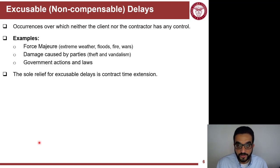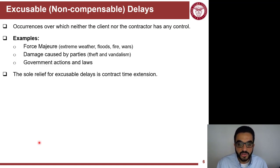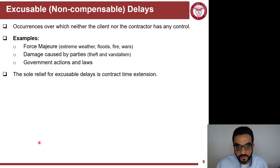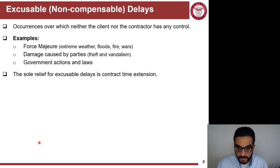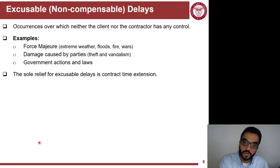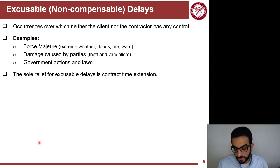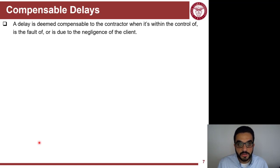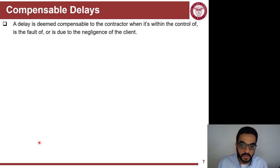The other type is excusable but non-compensable — things that happened not because of the owner and not because of the contractor. These are out-of-control issues such as disasters, force majeure, third-party damages, things not within possible control of the project team, or things imposed by government actions and laws. These require some kind of excuse for the contractor, but only in the form of time extension — this is why it's called non-compensable, meaning you are only allowed to finish later but are not given additional money.